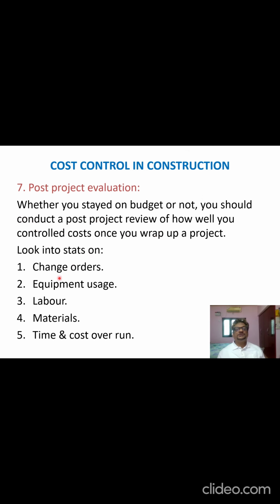The stats on change orders, equipment usage, labor usage, material consumption, and time and cost overrun, all these statistics have to be collected, and the data has to be there at the time of completion of the project, so the post-project evaluation can be done properly.